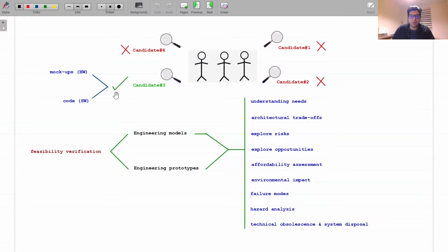The concept stage may include system and key system element level concept and architecture definition and integration, verification, and validation, or IVMV, planning. Early validation efforts align requirements with stakeholder expectations. The system capabilities specified by the stakeholders will be met by the combination of system elements. Problems identified for individual system element level concepts should be addressed early to minimize the risk that they fall short of the required functionality or performance when the elements are finally designed and verified.